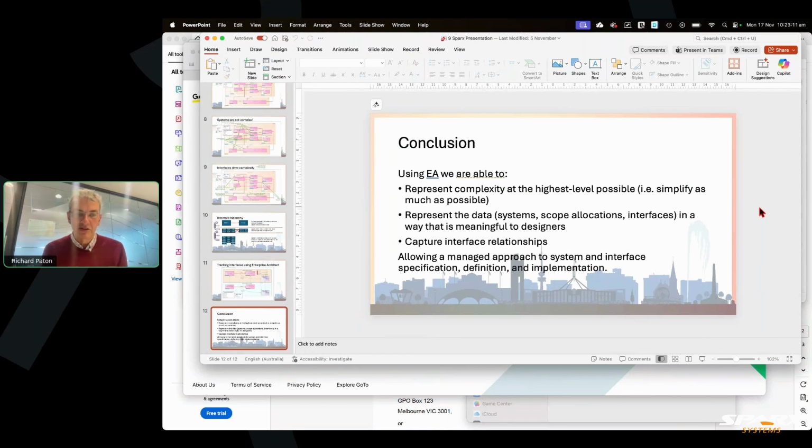And the package contractors would say, well, yeah, it's nice, but it's wrong because we changed. And these things have changed. And they would have to go back and redo the whole thing. So the cycle of getting the data right and getting a document out was so slow that it meant that they were always wrong.